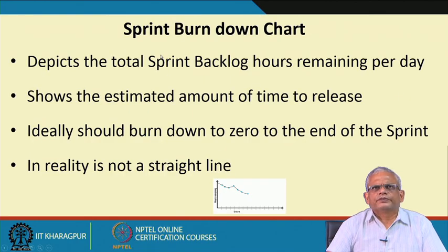First, let us look at the sprint burn down chart. This represents the progress achieved during the sprint. Typically it represents the hours remaining as the days progress.